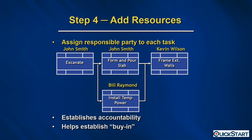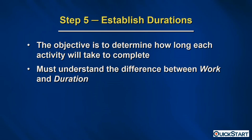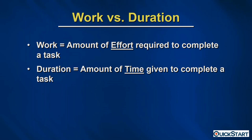Step five is to establish durations — how long each task or activity will take to complete. Before we do that, we need to understand the difference between 'work' and 'duration.' Work is the amount of effort required to complete a task. Duration is the amount of time given to complete the task. Those are two different things and can be a little confusing when you're new to project management.